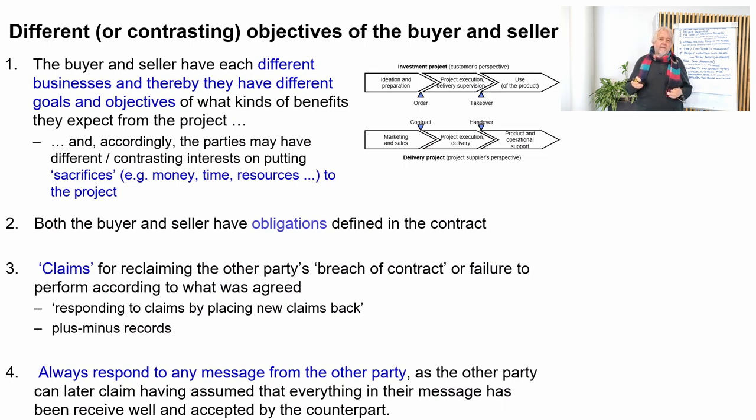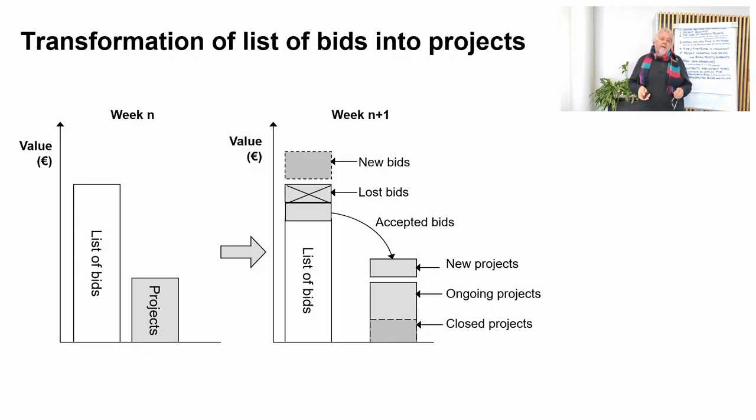And it's important in that way that if there come problems or even some juridical processes afterwards, and fights between the parties. So if you have not replied, the other party can say that, okay, we have informed you and we have sent you this message and we interpreted that it is okay because you didn't bother to respond anything. And then that claim might be strong from the other party, even though they might have done something that is, in principle, against your will.